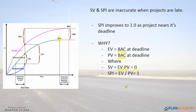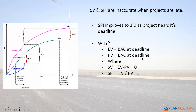What I'm saying is: let's say your project is three months late, but you're at the original deadline. Schedule variance, according to your baseline, says you're right on track — zero. There is no schedule variance, but you're three months late. Same thing with SPI, because again, EV equals budget at completion and PV equals budget at completion. So SPI tends to head towards one as we get towards the deadline of a project. Notice I said deadline — that's the original project's finish date, the baseline finish date. This is one of the problems that we have with earned value.